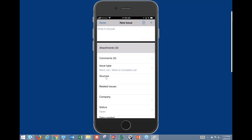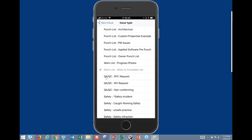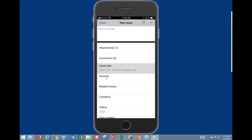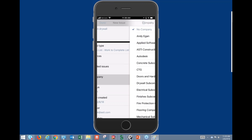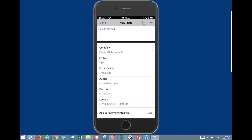This will be helpful for a lot of our subcontractors who are primarily responding to issues and updating statuses. We have the ability to choose which issue list this goes into — 'work to complete' is a good choice. We can assign the drywall subcontractor, the status is set to Open, the date created was today, and the due date is set to the next day. We can also change the location if needed.